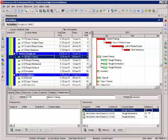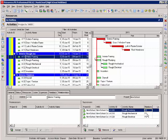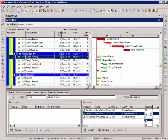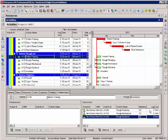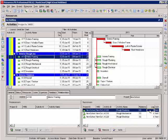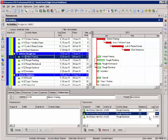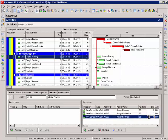I'm going to use my relationship column to change this to a start to start, each one of these. And then I'm going to change the lag to two days for each one. You can see that relationships are overlapping.